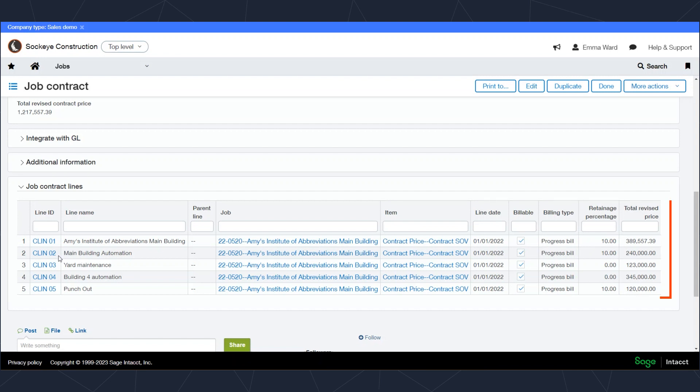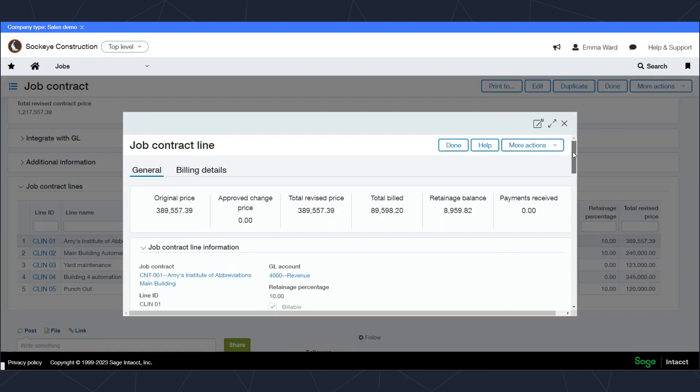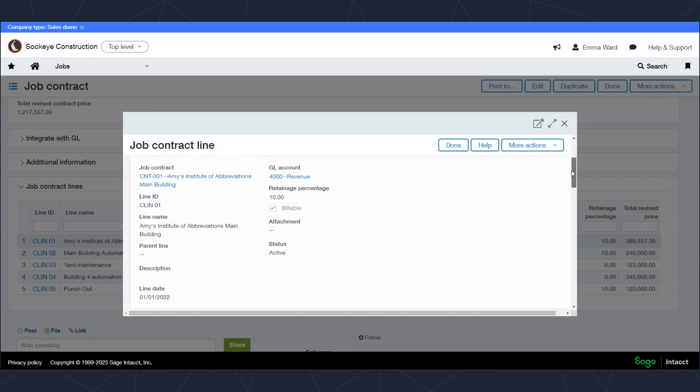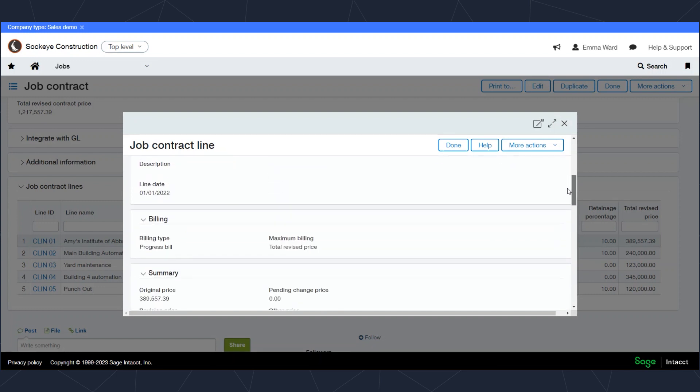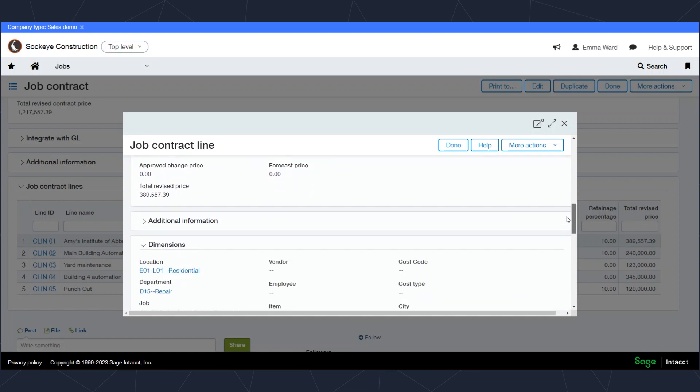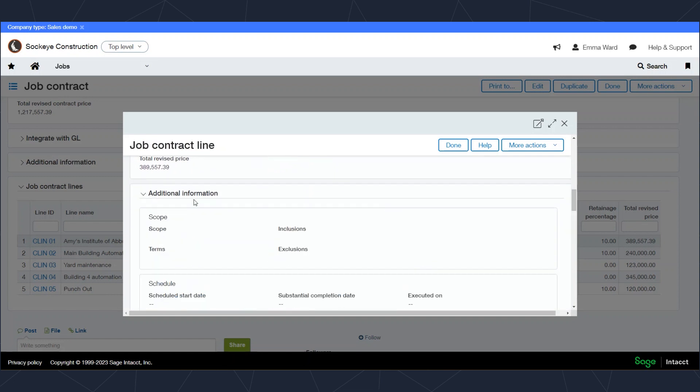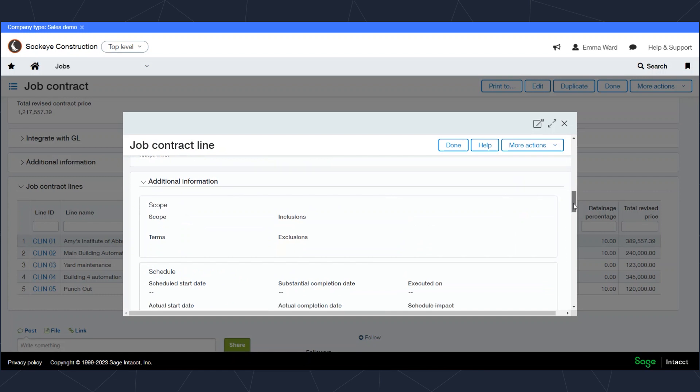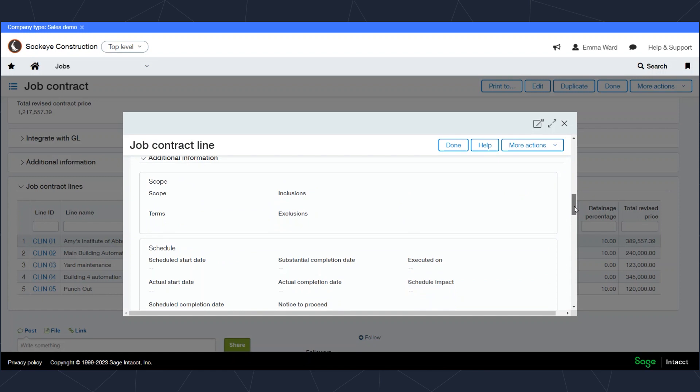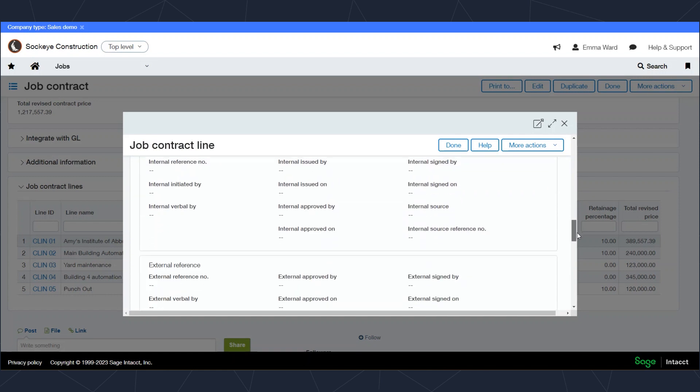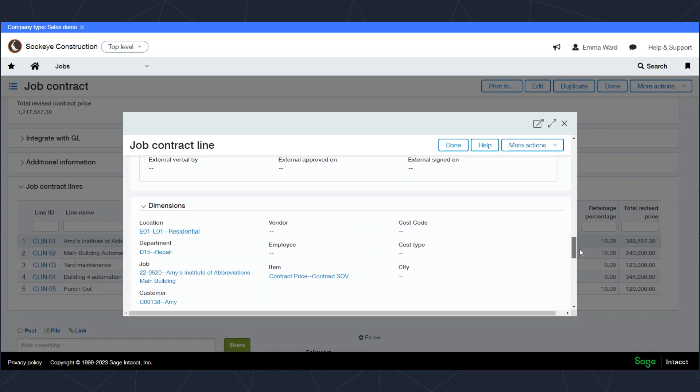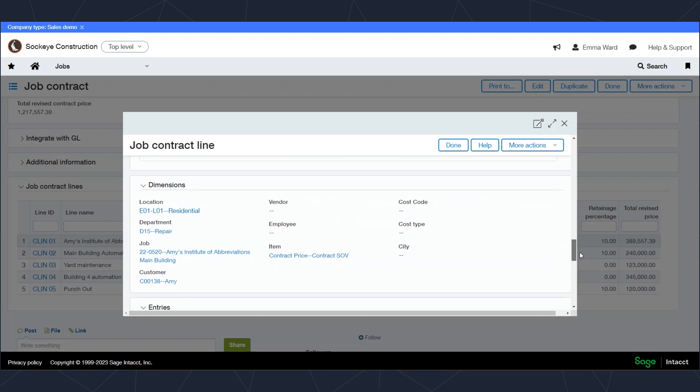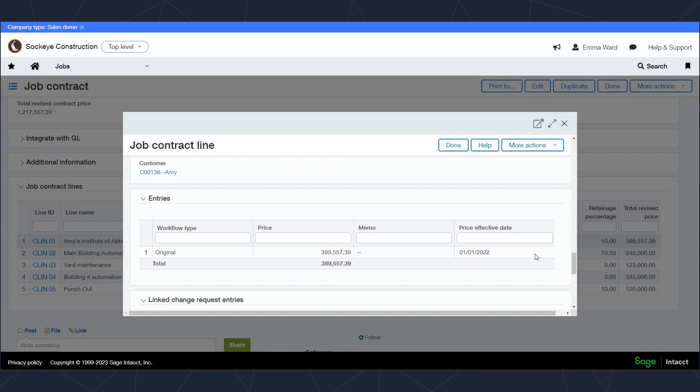Within each of these lines, I can click on an individual line and set up a lot of different fields, a lot of different information on the lines itself, as well as other information. And here, the additional information section can record things like the scope of the schedule line, as well as what's included, what's excluded, and the dates associated with that line. It's an optional section you can choose to keep or leave out. On the bottom, we'll see the different breakdowns of the dollar amounts for that schedule line, as well as any change orders that have affected that line.